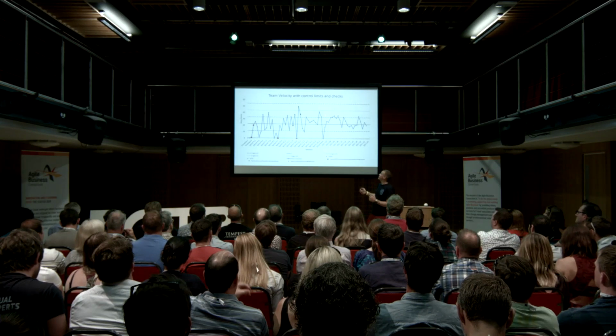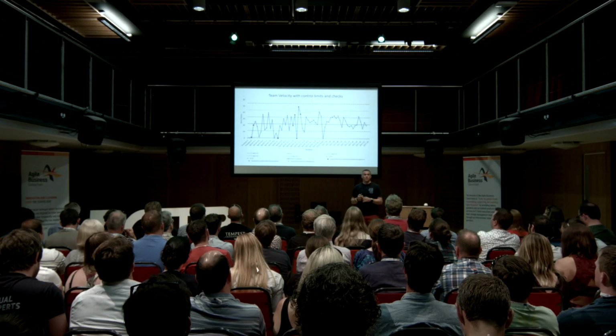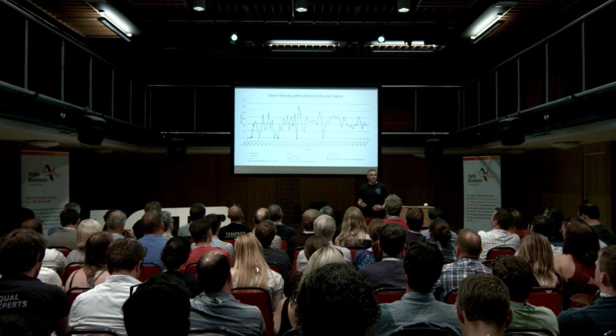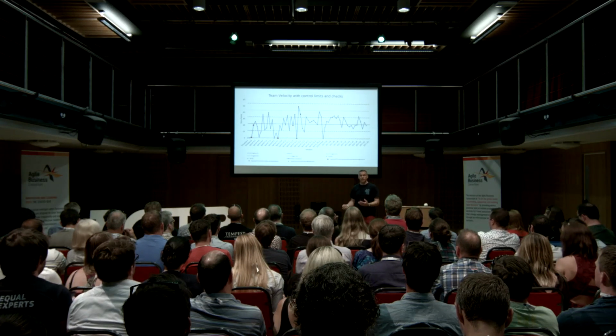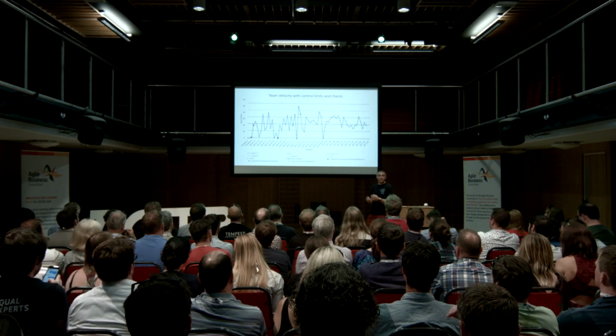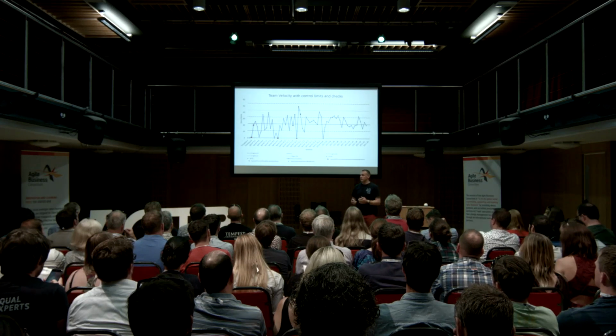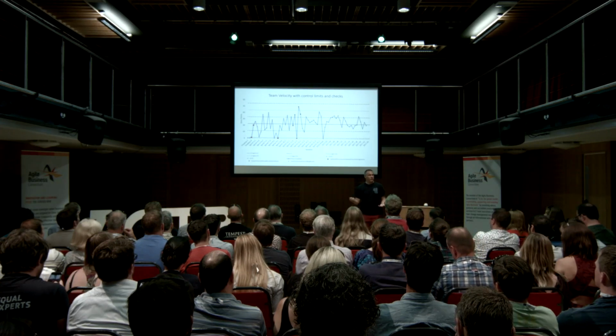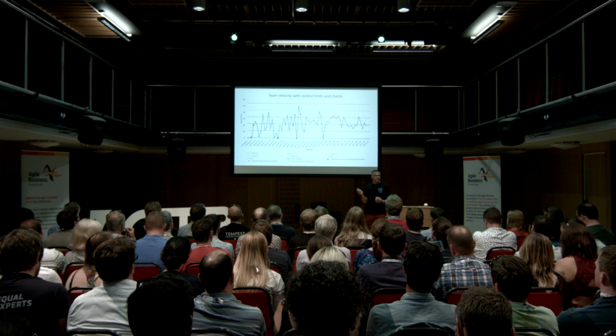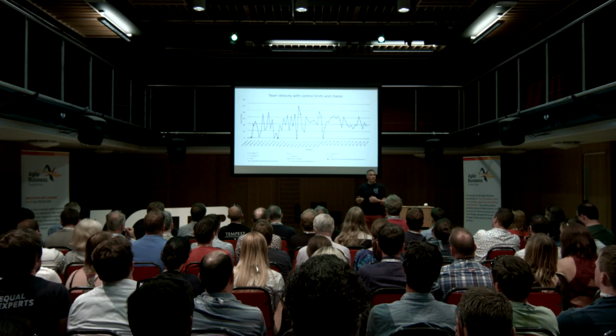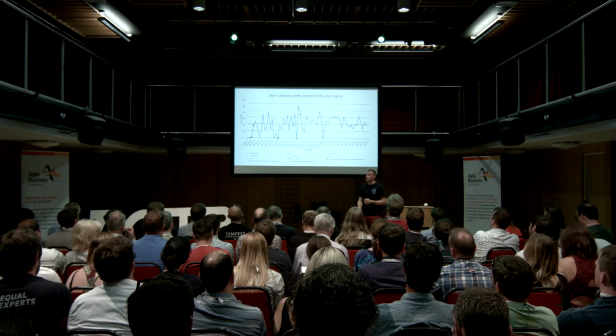If we had a retrospective and came up with some things we might do to improve our efficiency, then this is a great indicator that that's clearly working. But if nothing had changed, then this is highlighting that something looks different, so it might be something you want to drill into in more detail.